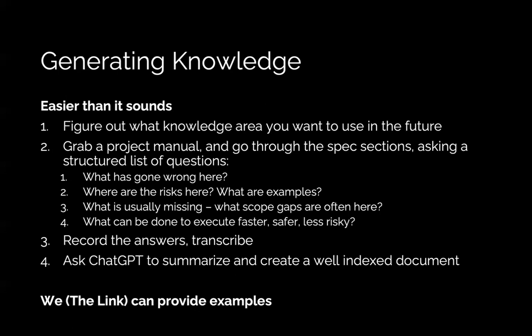So now you're not asking somebody to scratch their chin and tell you all the things that could go wrong. You're grounding it in real projects, and that tends to be a way better way to get a volume of information from someone as opposed to a couple of top of mind ideas. So asking what's gone wrong here, what are risks here? Are there any examples you have? And just record this. You don't have to type it, you don't have to write it, you can transcribe it. What is usually missing? And again, you can expand this list as you see fit, but these are some easy questions, and you just roll through this section by section until someone tells you I got to go to lunch.